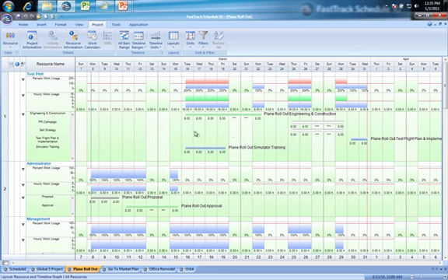Now in FastTrack Schedule, you've always had the ability to spot allocate. Meaning I can come to any particular day and change the duration of work on a day. So I changed that to 1, and now you see my graphs have changed and my resource is happier on the 16th of March. However, we've improved the workflow here by allowing the ability to redistribute effort across a task.